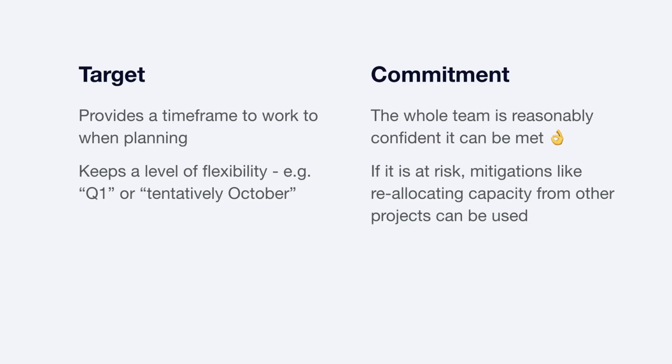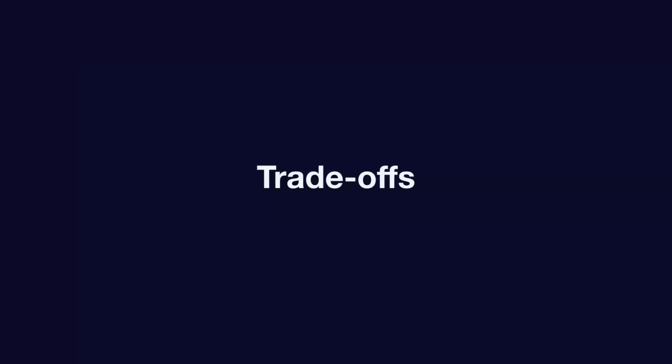And there's a big difference with the commitment in terms of the kind of mitigations we might take if we find that things are going a little bit wobbly. So if a commitment's been made, the business should be at a point where if the time is drifting, they're willing to put even more work or resource or buy pizzas or whatever it is to get that thing over the line. If you treat every target like that, you don't really have a workable business, and you've got burned out people and all the rest of it. So there we go. That's dates.